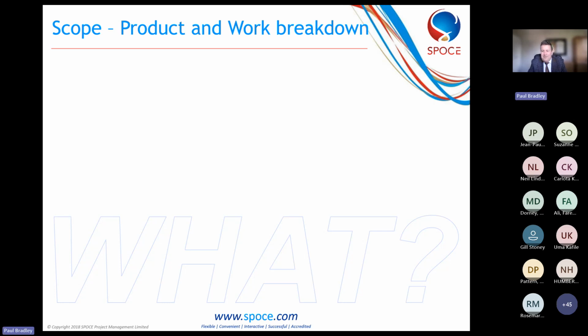Now, many of you may well have already used work breakdown structures, but it's good practice to start with the products first, the outputs, so we understand what we're delivering before we start thinking about what we're going to do. And by understanding the products that we're delivering, this will help us establish the scope of the project.